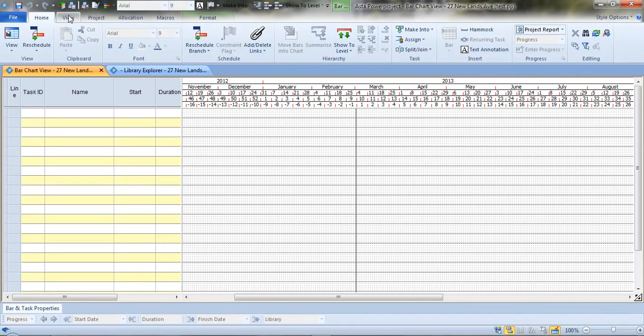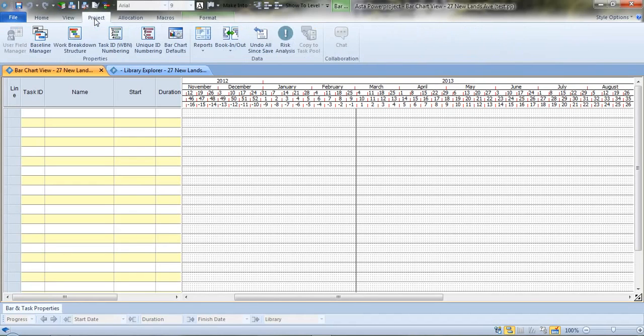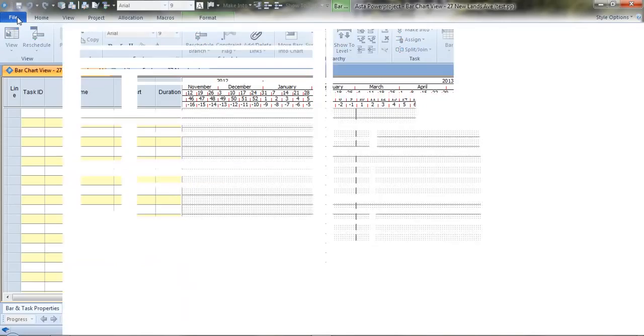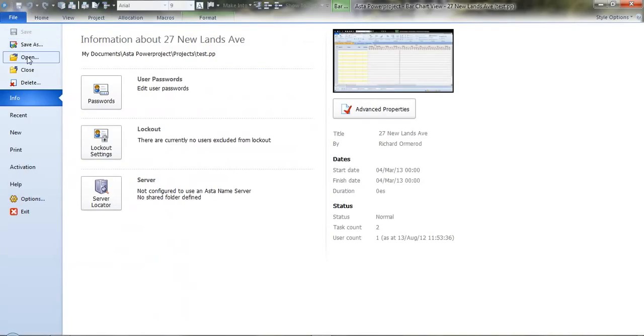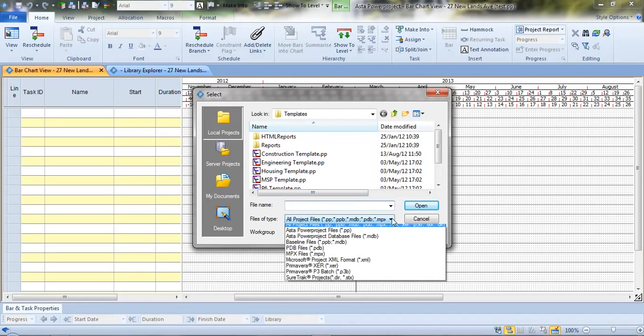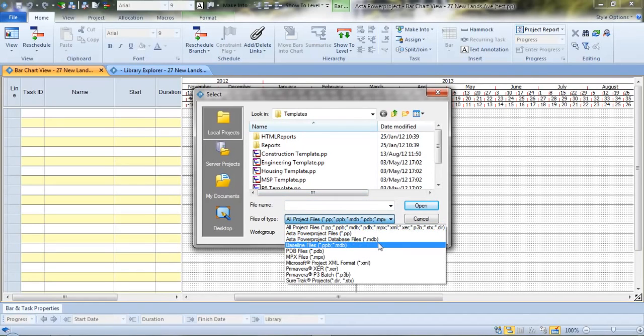The usual options are now available on the various ribbon tabs. We can save that information, but also we can save as or open that information from other sources. If you had information that somebody provided from, let's say, Microsoft Project, if they save it in an XML format, you can open it in PowerProject. Everything that you have got in Project will be in here.